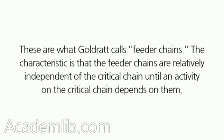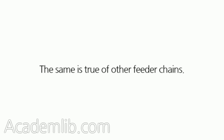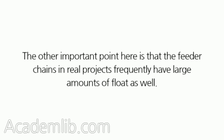The characteristic is that the feeder chains are relatively independent of the critical chain until an activity on the critical chain depends on them. In Figure 5-27, feeder chain A, B, C, D has quite a lot of independence until the time activity P on the critical chain depends on it. The same is true of other feeder chains. The other important point is that feeder chains in real projects frequently have large amounts of float as well.